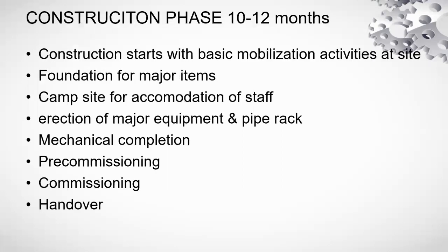Now we enter the construction phase, which is again expected to last for 10 to 12 months. Now remember, although I mentioned these durations, these phases overlap, and the overall estimated time frame for a project from the start of detail engineering is probably 24 to 36 months, with a major overlap of the detail engineering and construction phases.